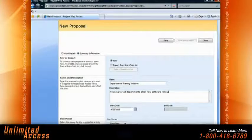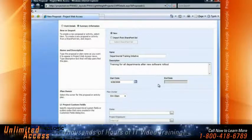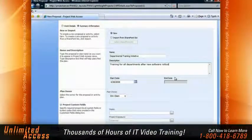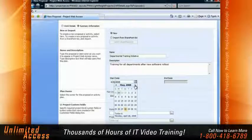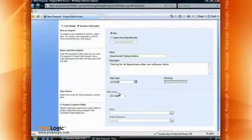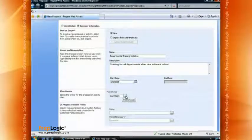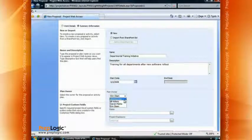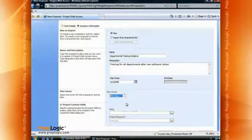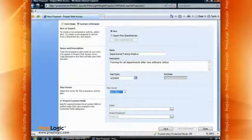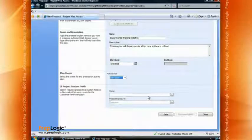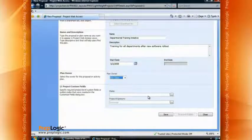Coming down, you'll see other things you'd expect with any project. You can designate a start date — the end date will typically be configured by the server once you get this put in — so I'll set a date a little bit out into the future using the calendar control, scrolling over a couple of months and choosing the second. I can also designate who the owner of the plan is; the owner has overall control as well as accountability. I'll keep myself as the owner. If you're working with workflows, the state field becomes appropriate — is it proposed, is it approved, and so on. I'm not going to be using workflow, so I'll simply click Save.